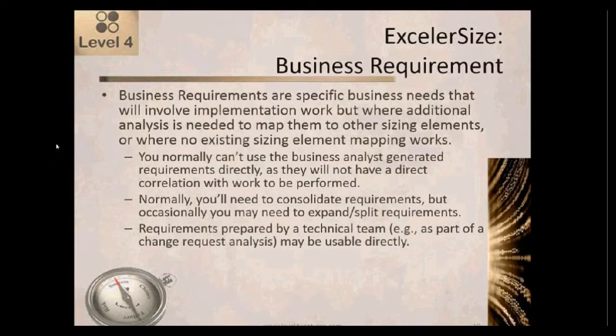So there's a business requirement, it's going to require some coding, but when we look at the other ExcelerSize sizing components, none of them seem like a good fit. So in that case, we would use business requirement.